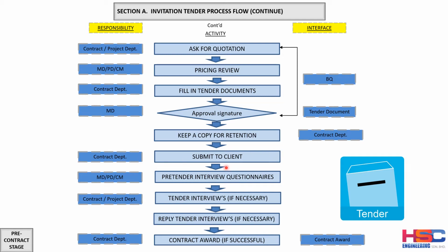And once that tender has been submitted to the client, the managing director, the contract manager, or the contract department, or the tendering team have to review the interview questionnaire, whatever the questionnaire given back by the client to them, and the contract or the project department have to attend the tender interview meeting if they were called by the client.